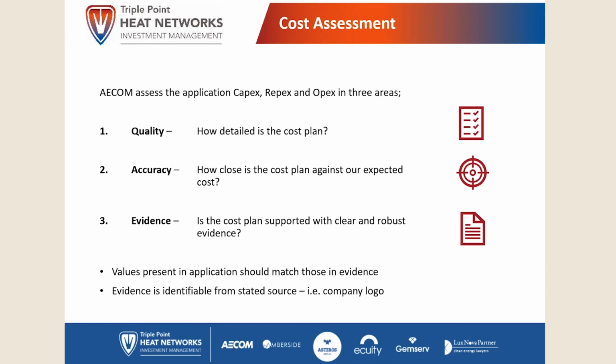If you have a D&B contractor's quote, then clearly your cost is right regardless of what our model says, because that's what you will pay. If you have a benchmark, then clearly we're a bit concerned, because if there's a variance, it may be that benchmark isn't most appropriate. So we may come back and ask for more information on that. So trying to provide us with as much explanation of how you've derived your costs is useful, because it saves us having to come back for clarifications where there are variances to our model.